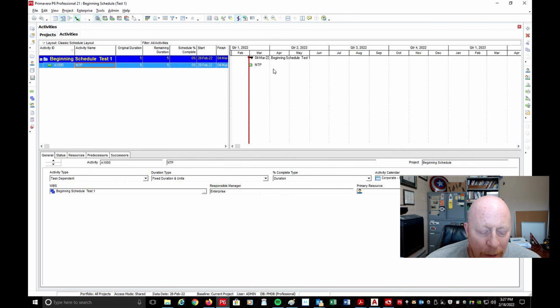Okay, now a notice to proceed is a milestone because it is a piece of paper. It is a moment in time. Okay, it is like the owner says, okay, we're ready for you to start building. We're going to give you the notice to proceed, to the GC, and say you may start building. It's kind of like the approval, right? Because as a general contractor, you're not just going to be like, oh, I'm just going to start building whenever I want. No, you've got to wait for that. Okay, so it's either email, fax, who knows, Pony Express, however they get it to you. It's a notice to proceed.